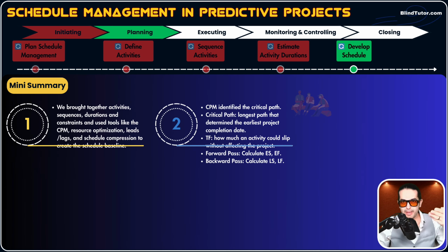We found different paths available on our schedule network diagram, and the longest path is called the critical path. And we know that activities on the critical path have a total float of 0, so we cannot delay the start of those activities. Those activities are vital for us. We take good care of them.